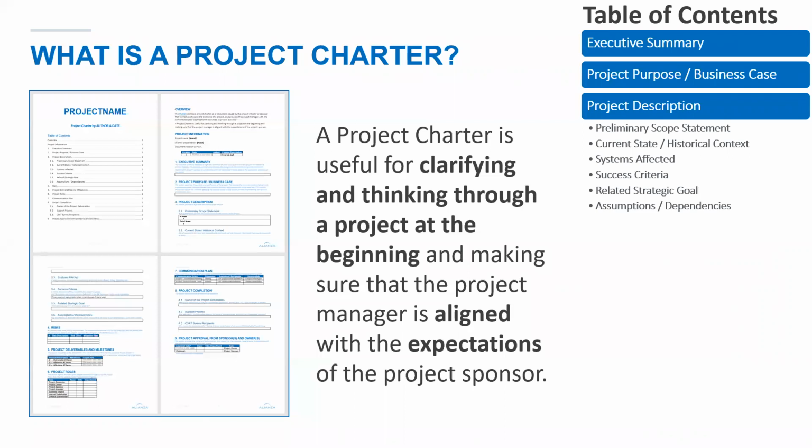Have that conversation. Related strategic goals, if this is aligned to our improve operational efficiency project, our goals as a company, it's good to help people make the connections that this really does have to do with that thing that we decided at the beginning of the year we're doing. And assumptions and dependencies, if there are things that this project is only going to work assuming that this is actually the case, and if that changes, this whole project could be different. It's good to think through those kinds of things beforehand.